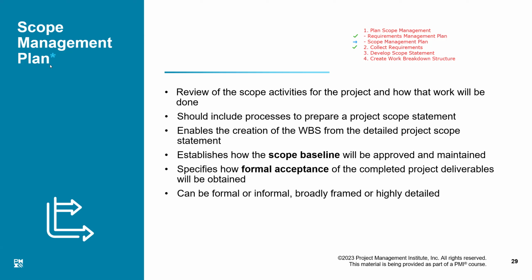Meaning, how to establish the product scope, how to establish the project scope, and as we talked about in requirements, how to do the product analysis and the alternatives analysis, and come up with an ultimate scope statement, which will include the product scope, the project scope, the alternatives, and various things like that. And also, any constraints, limitations, risks, etc.